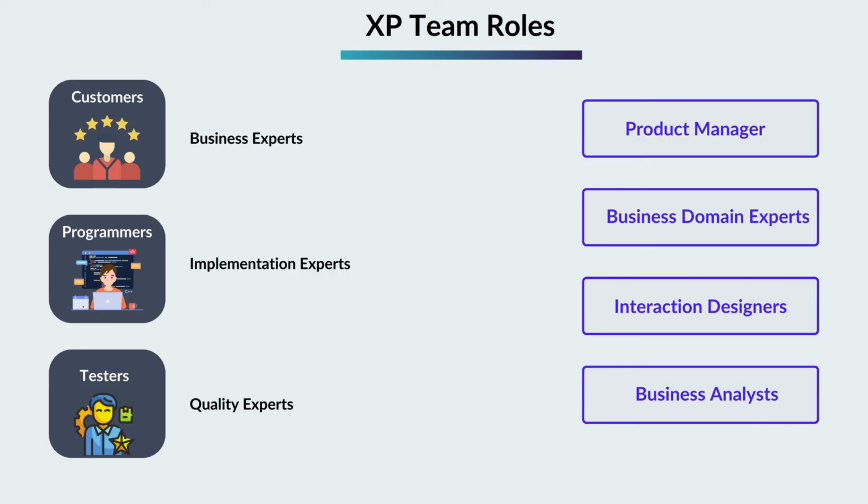Programmers are the individuals responsible for writing code and implementing the software. XP programmers are expected to be versatile and cross-functional. They should be capable of working on a wide range of tasks, from coding to testing and design. The team typically consists of 4 to 10 programmers.